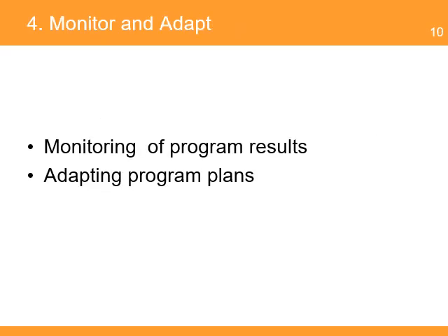The program manager monitors and adapts the program plans and facilitates the interaction amongst projects, manages changes, and mitigates risks. Each project manager provides a status report on the progress, and the information is integrated to allow a comprehensive status of the program. As the program makes progress, there will be instances where changes are required to help the program and its projects adapt to changes in the environment. All changes go through a change request process and are analyzed and approved before they are implemented.